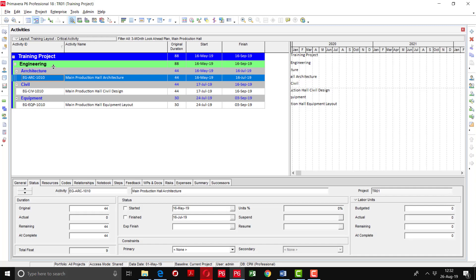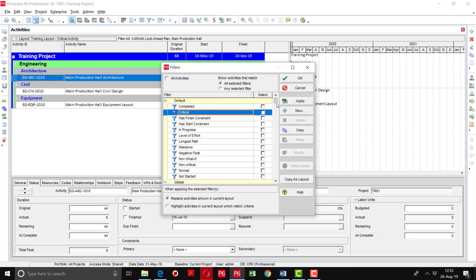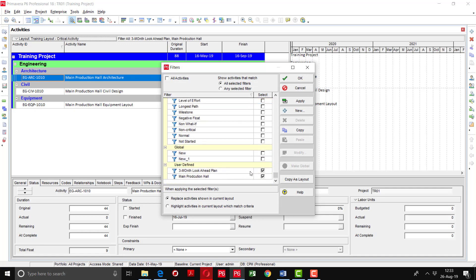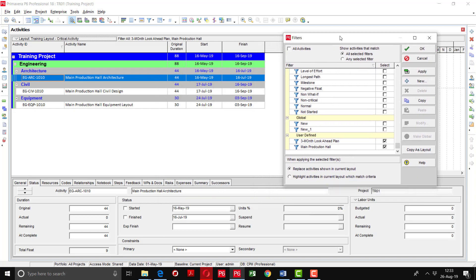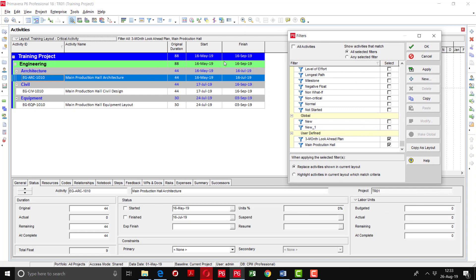You can see that the activities of the main production hall are showing here. The main production hall activities are defined in architecture, civil, and equipment. In this way you can customize the filter according to your requirement. You may notice that two filters are applied here at the moment together — I did that intentionally so I could show you how to select one filter. Previously I created a three-month look-ahead plan and now I created another layout for the main production hall, so the current window shows the three-month activities of the main production hall.